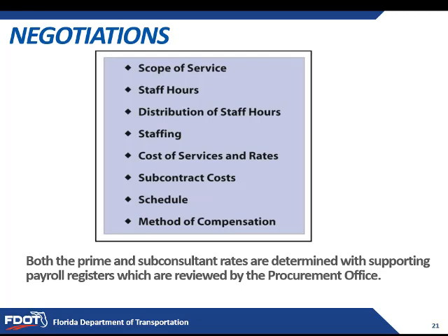Distribution of staff hours. Distribution of staff hours is negotiable. It is necessary to have all the appropriate staff to support the work needed for the project. This staff typically consists of a range of different employees within the levels of experience. If the consultant is proposing to use experienced higher paid staff for specific tasks, these can be redistributed to less experienced staff members, or the hours can be reduced with the understanding that the more experienced staff can complete the task more efficiently.